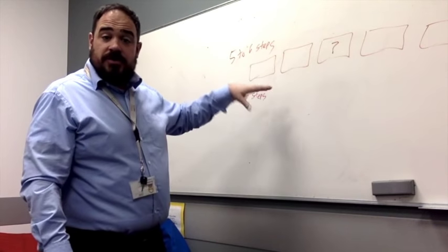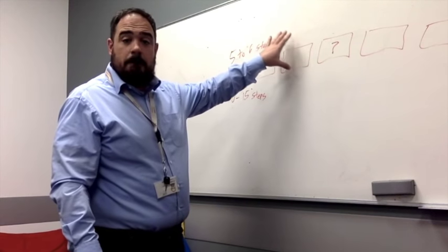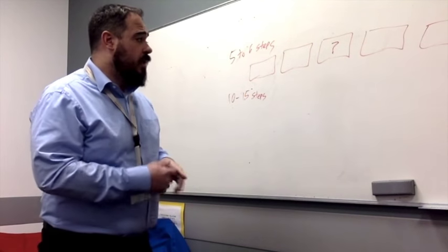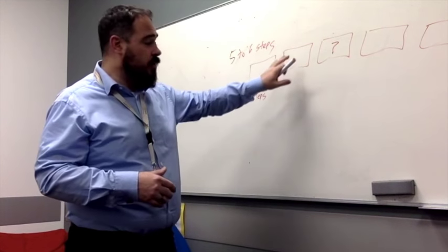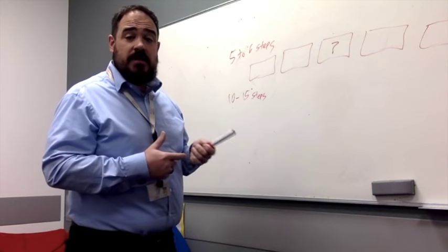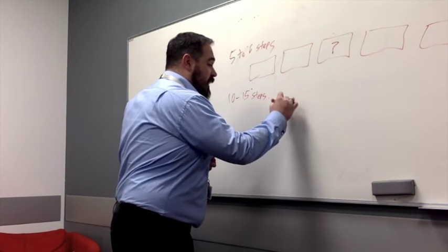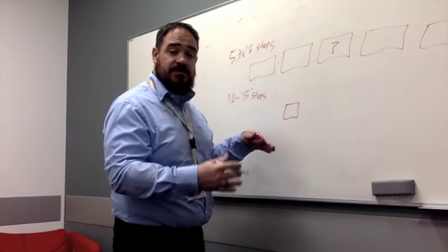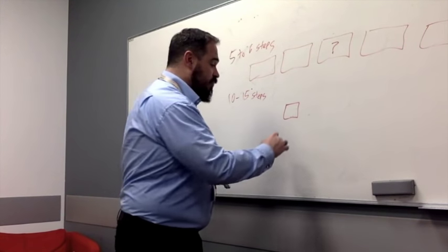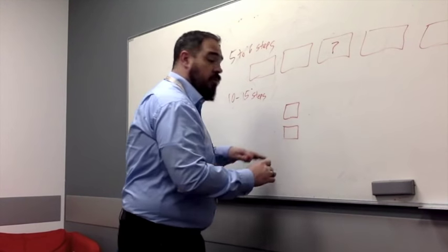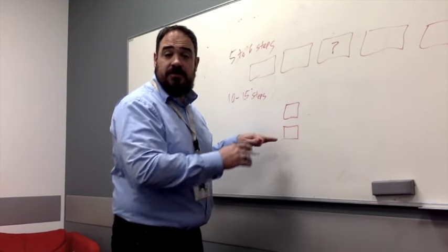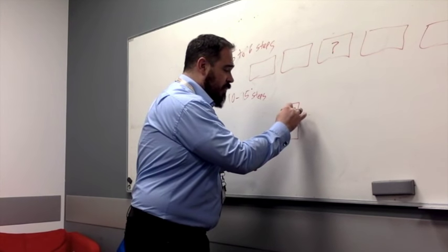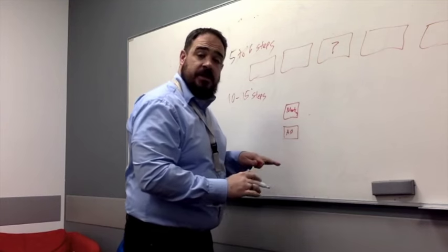So one of the steps that we want to start digging into is this one that says plan out what we're going to do, plan that activity. So we've already done the review of the ticket, now we're at the planning phase, right? So planning might be that we have a meeting. Pull everybody together for the meeting, and the outcomes of that meeting would be high-level objectives, right? Then we're going to look through and maybe create action plans for each of those high-level objectives. So we've got our meeting here, and we've got our action plans here, right?